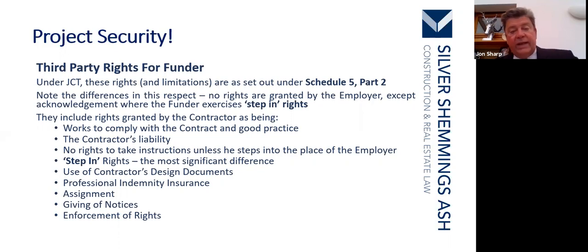They include rights by the contractor as being works to comply with the contract and good practice. The contractor's liability under the contract: no rights to take instructions unless he steps into the place of the employer. So the funder may sometimes, if an SPV, special purpose vehicle, goes bust, step into the shoes of the employer. Step-in rights, that's the most significant difference.